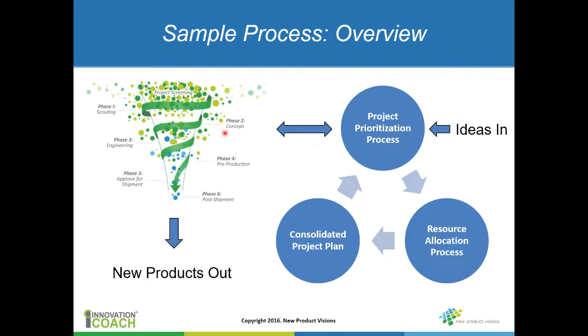And of course, out of this process flows the projects that you actually assign resources to, and those projects enter into your phase development process that we covered in a previous webinar. However, really there's a lot of interaction between particularly the first couple phases of your phase gate process and the portfolio management process, because you may learn something, particularly in the prototype phase, that forces you to come back and reprioritize that project against maybe some other new opportunities. So there is interaction between your phase gate and your portfolio management process.